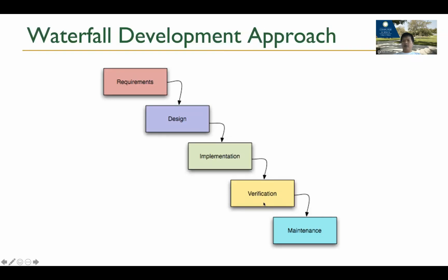All right. So here you need to understand one thing about the waterfall approach. Let's say I have 1 year to develop a project, and I follow the waterfall approach. You need to finish your requirements completely and write the documentation, know exactly what you want, right? Probably that stage will take about 1 month. After that, we need to do the design. Now this design, we're talking about a very detailed design.